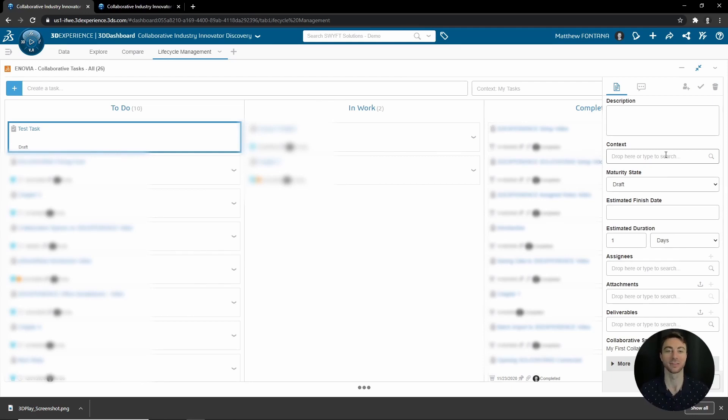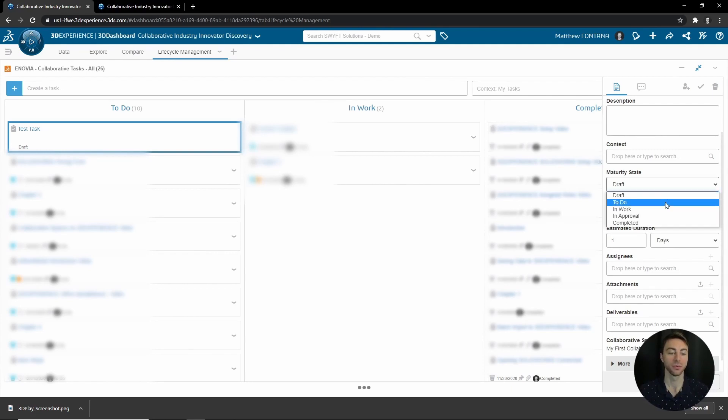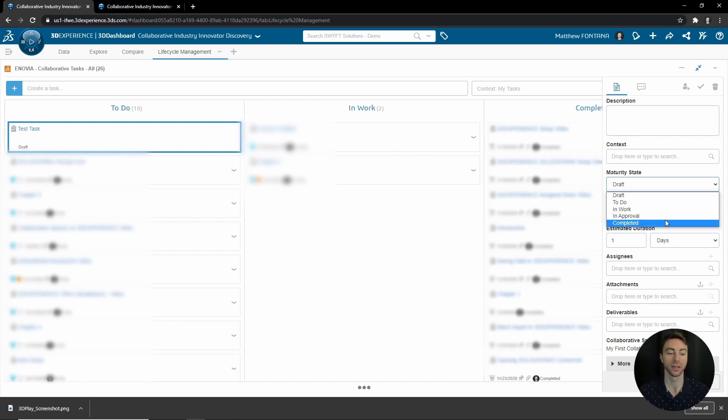The maturity state allows you to move it from Draft to To Do to In Work, then to an Approval. After an approval, it can go to Completed. You can also simplify this by just clicking and dragging to these three states here.